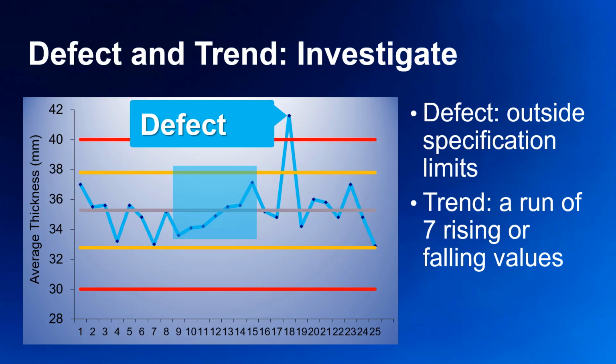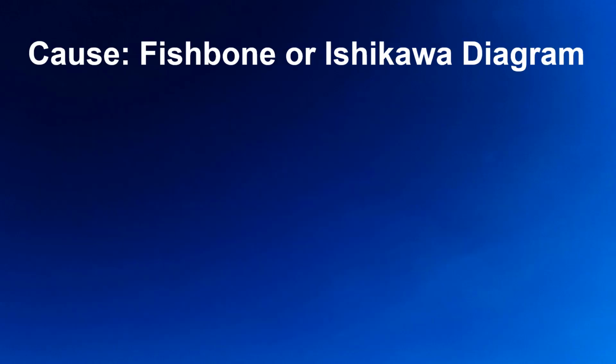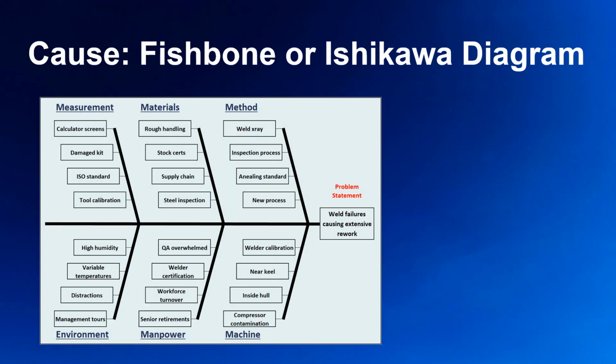And one tool that we use to analyze the potential root causes of our anomalies is the cause and effect diagram. There's a reason why this is also called a fishbone diagram. Some may argue that it works like a tree diagram, where we decompose categories in details. In this case, we start with a problem statement on the right and work backwards to identify potential causes along the relevant categories. The lines routing backwards look like the bones of a fish.